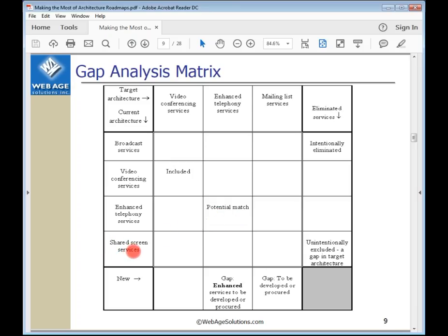And then an additional thing that was identified in the current state is basically saying it's not part of this target architecture, so it's not going to be used in this way. And then, of course, don't forget that part of the gap analysis is to identify anything that's new. So it's not part of our current, but basically in order to fulfill some key components, we've actually identified this is what we need to add, right? So something that we might be building, might be buying. So that decision comes after that gap analysis. So again, this will lead into that conversation with determining the best approach.